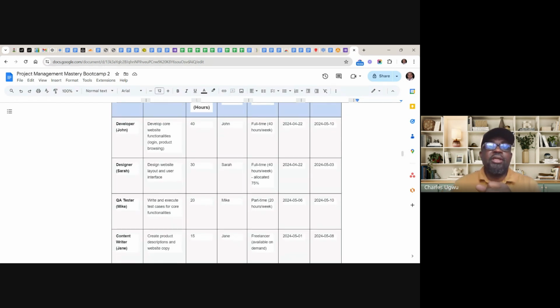So here you see designer. The designer's name is Sarah, and the task or deliverable here is design website layout and user interface. The hours here are 30 hours, assigned to Sarah. Availability is full-time, 40 hours a week, allocated 75%. So he's not taking the full hours.